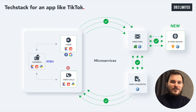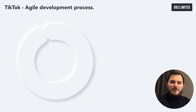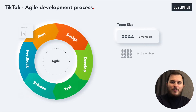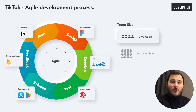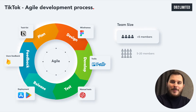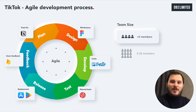The software development approach is different from a classic business model because you need to consistently update your app to satisfy the fast-changing needs of the market. The key benefit of an agile development process is speed — being able to quickly adapt your product to fit the needs of your market — but agile can also lower your overall impact level by up to 30%, so it's incredibly important to have proper management tools. For a small team building the MVP — say four to six developers — each will understand their own tasks and communication points. Simple project management tools like Trello, Asana, Google Docs, short meetings, and weekly reports on delivery are enough for effective communication.